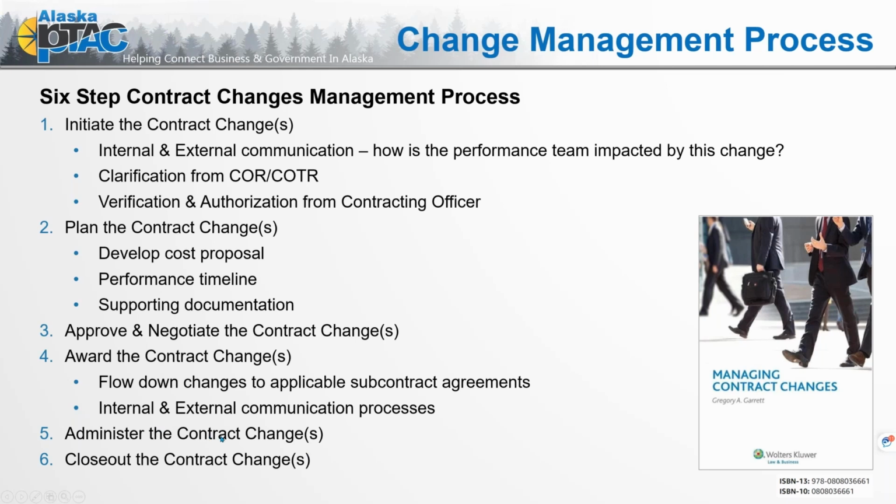Then we're going to administer the contract change, and of course we're going to close out contract change. So we're not talking about necessarily closing out the contract, but that change itself. If it is standalone in cost in nature and you've made sure that it's been billed and thus been paid, great. From an accounting perspective, we can call change number 1 of who knows how many may happen during the life of that contract, but then you can note that in your contract files as that change has been fully incorporated in that cost paid. So part of that contract change closeout process.